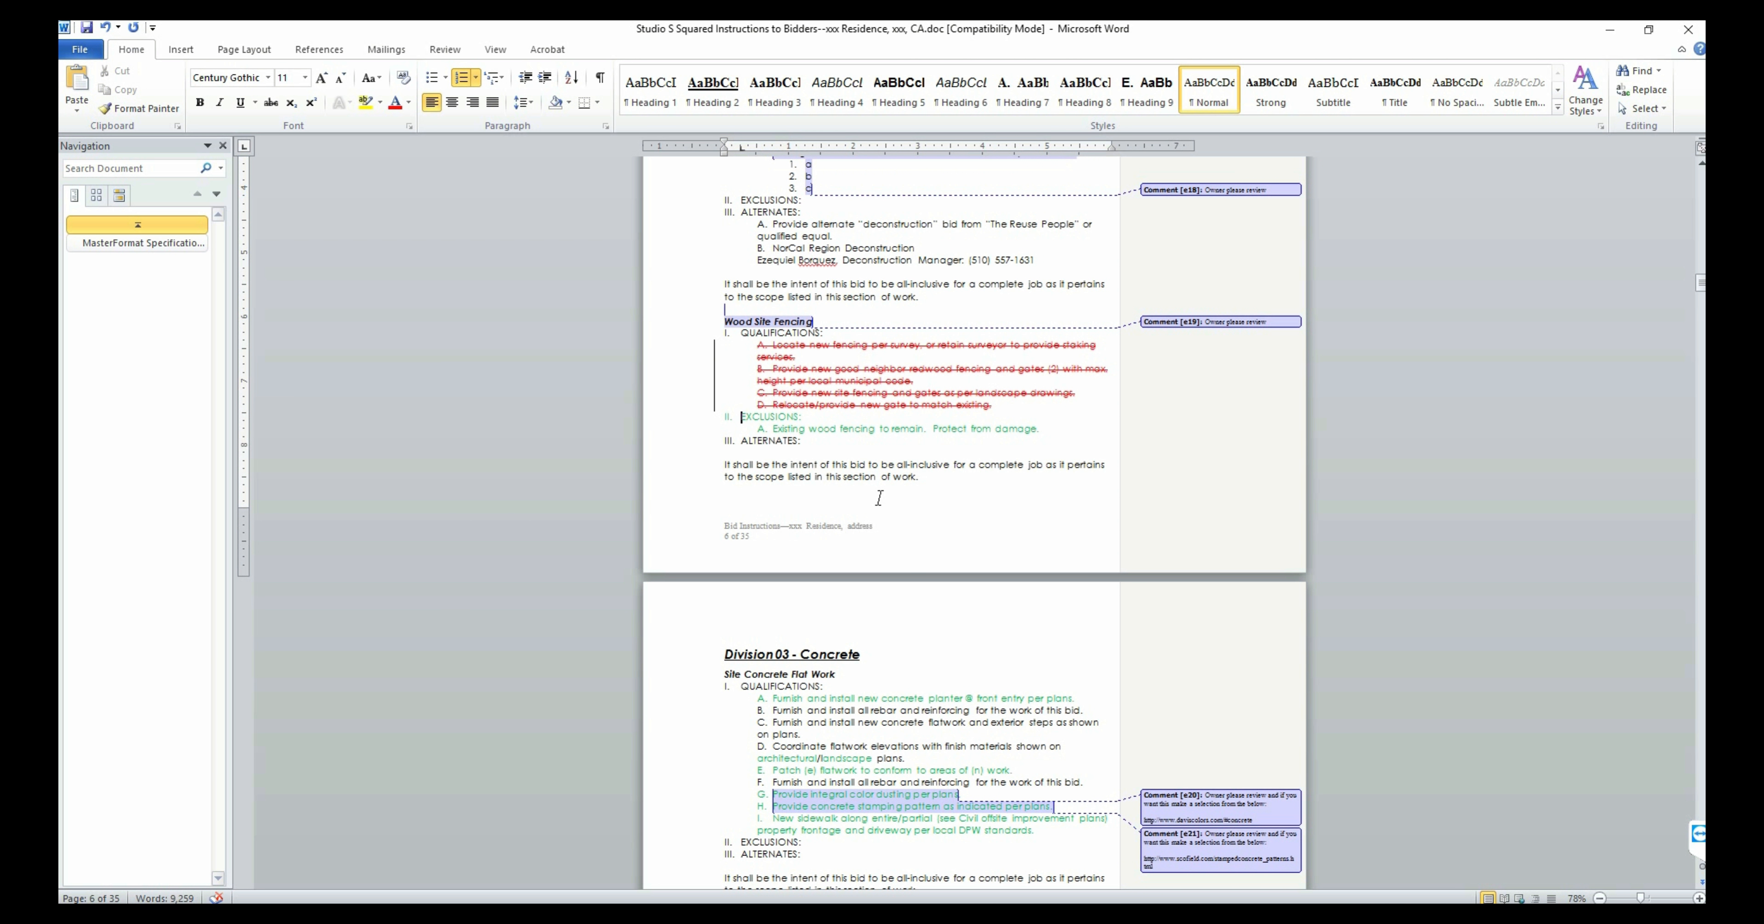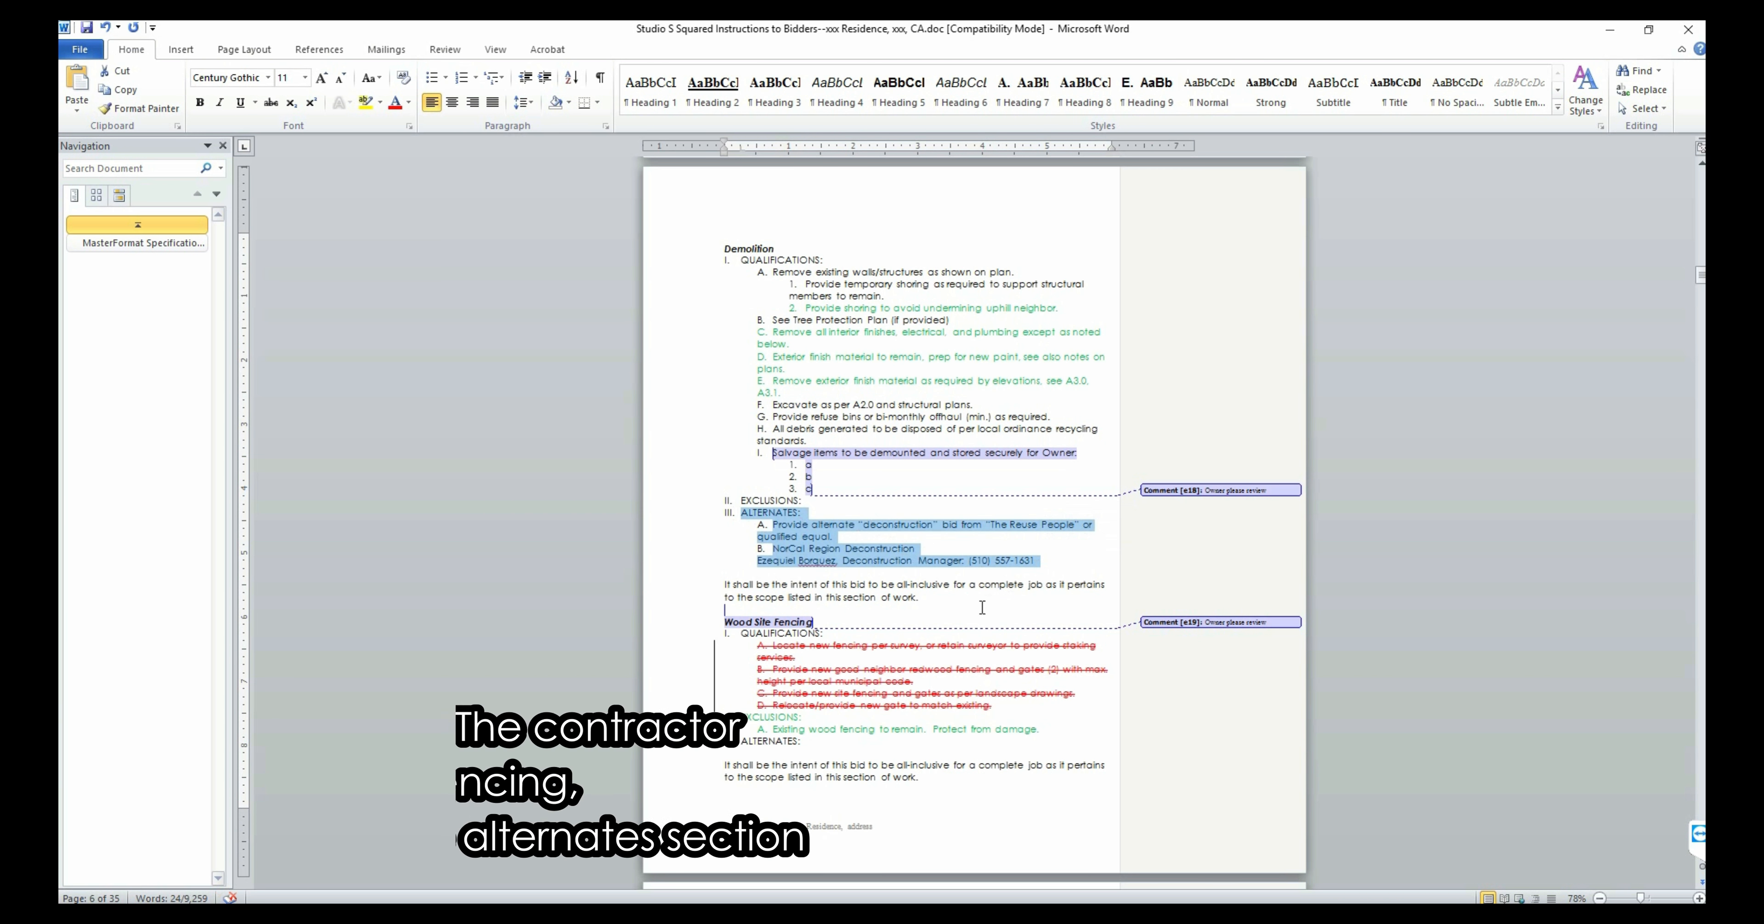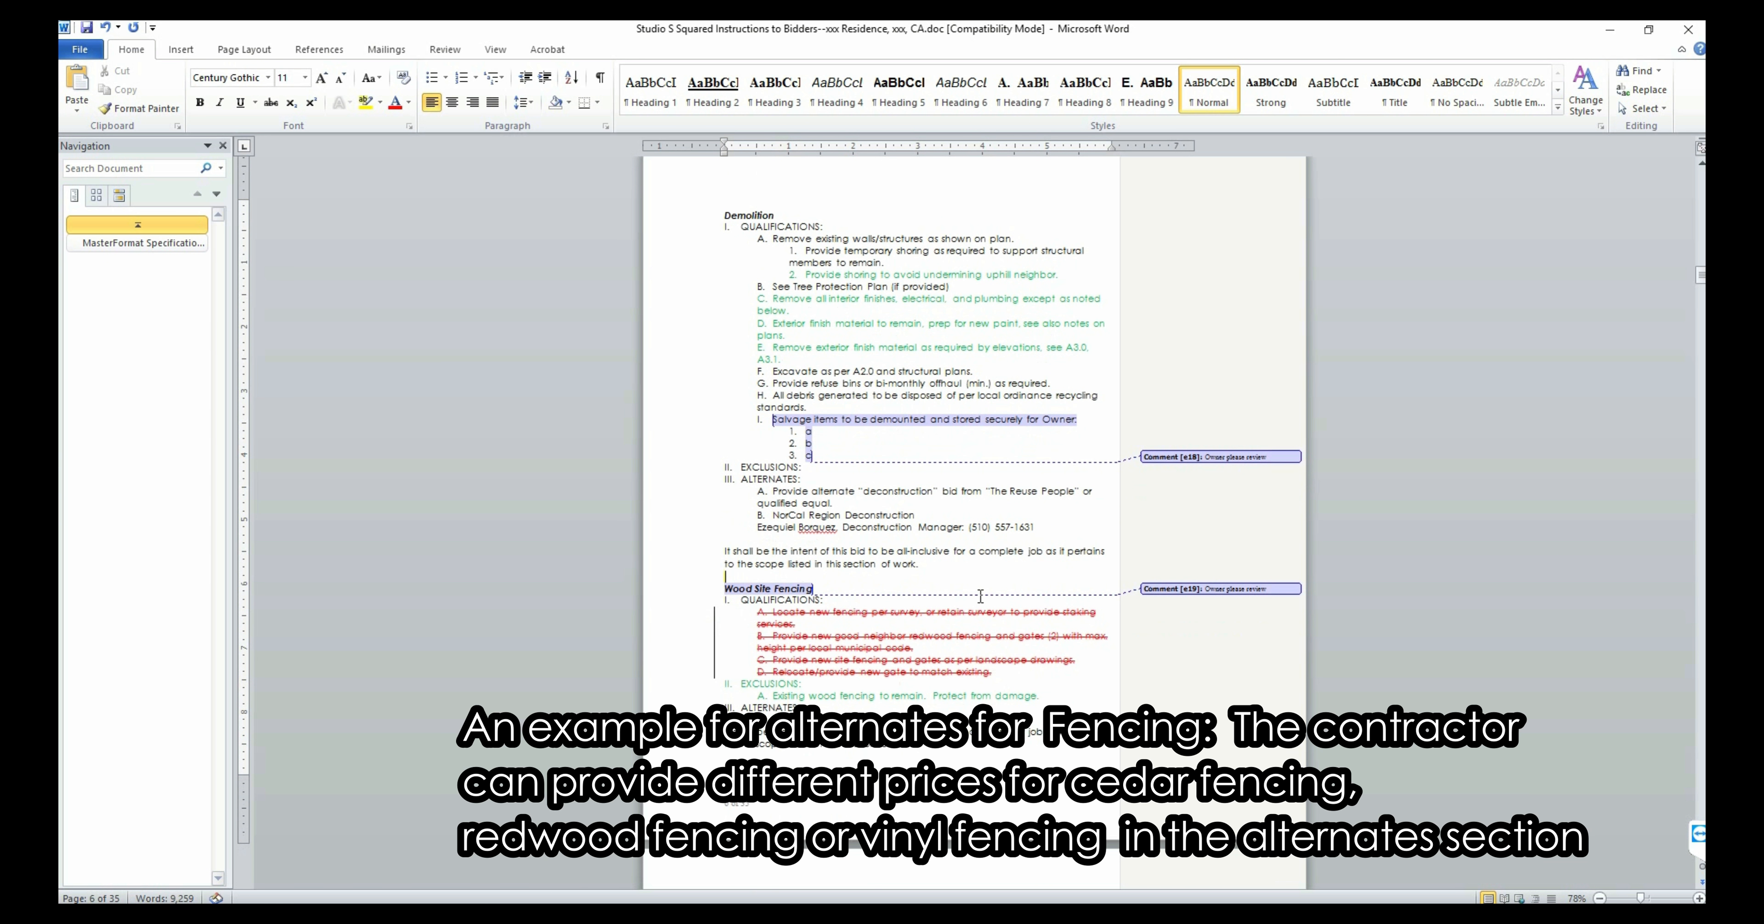The third section is the alternate section. You can add the items that you are considering to include as part of the scope of work but would first like to know the price before deciding. The bidder will provide a price for this alternate item and you may choose to include it or remove it from the final bid.